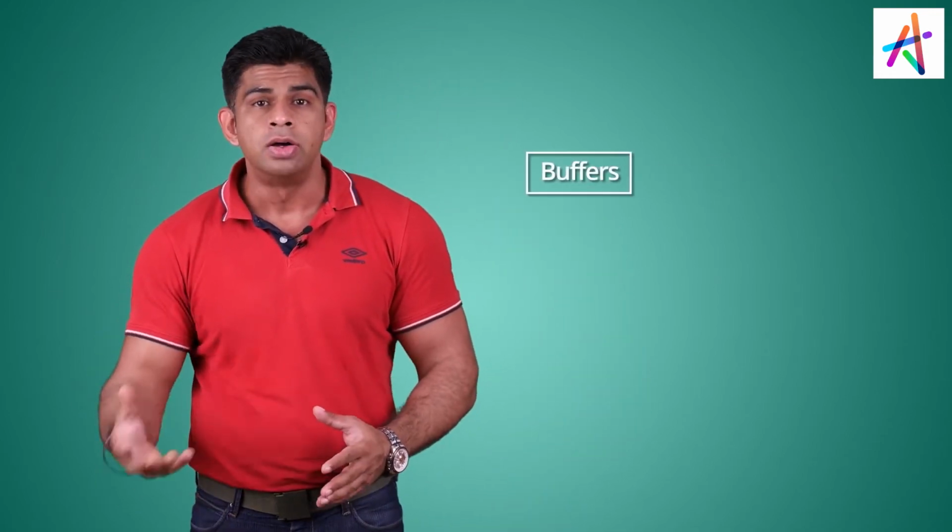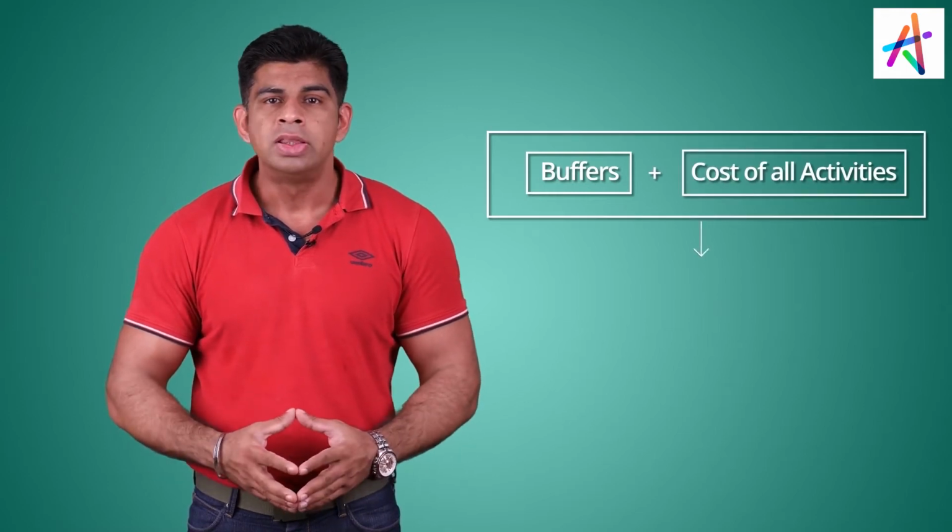How can you estimate the activity cost? You can estimate the same method the way we estimated the duration. You can either look at the history or you need to estimate the resource requirement. Depending upon that, you can identify what should be the cost of the activity. So either history or you have to do the brainstorming, right? Which is both the similar methods with which we estimated the duration. After estimating the cost, we need to combine all the costs for all the activities and if required, add buffers, add reserve, right? To come up with the budget.